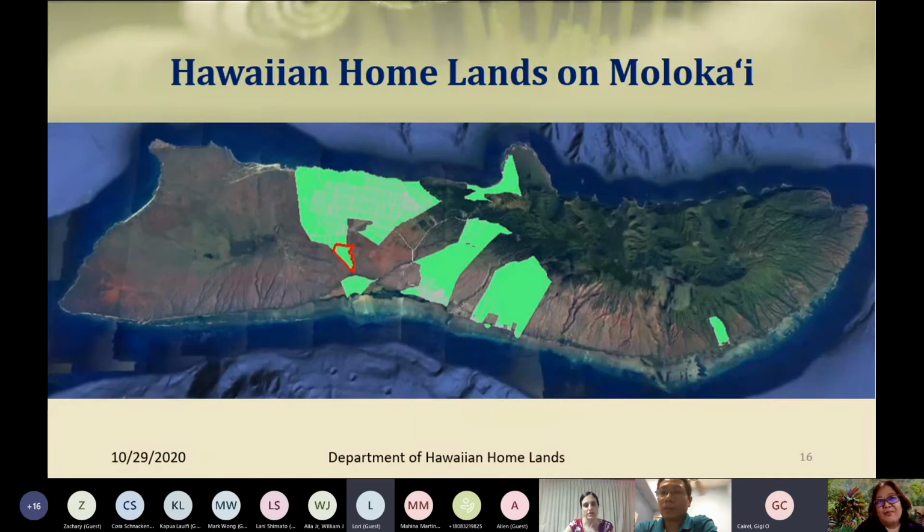Hi, this is Becca from Hawaiian Electric again. So in this solicitation, the smallest size project that we're looking at has to be above 250 kilowatts. So we're not looking for an aggregated solution of multiple rooftops. If there was a really large roof somewhere that could fit that size of project, then that would be allowed. But the way this particular solicitation is set up, it's looking for one point of interconnection from projects that are at least 250 kilowatts or bigger.